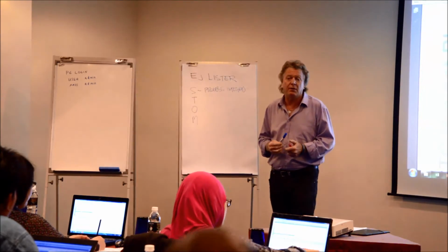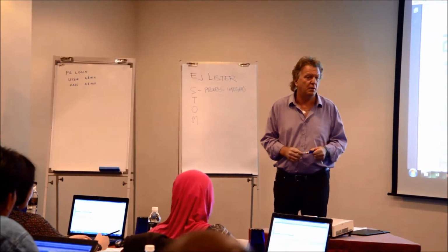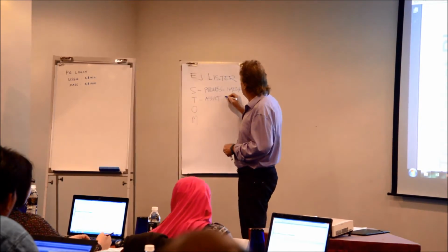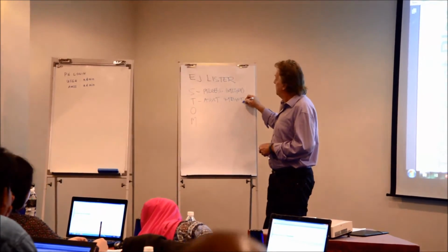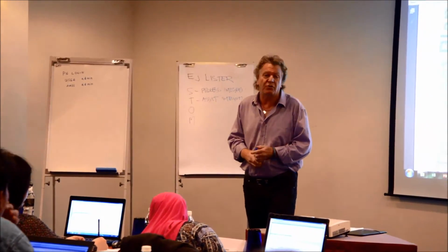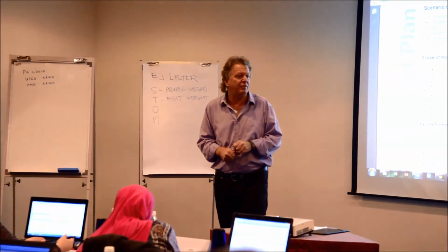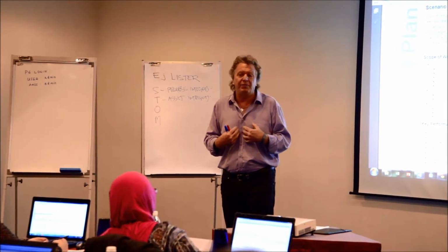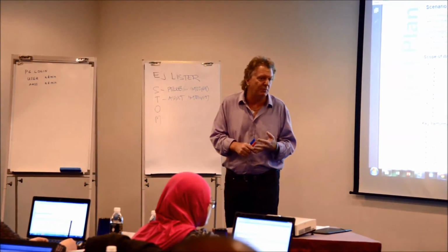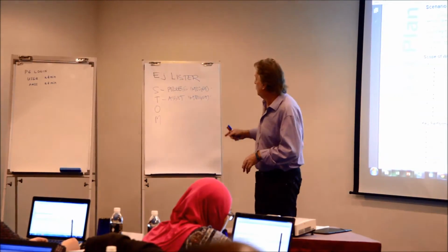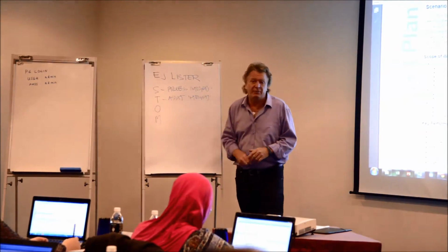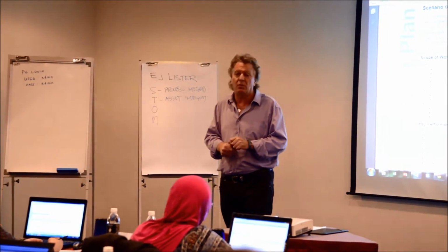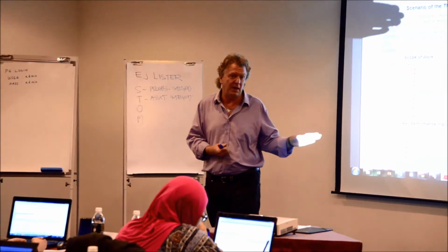So what do you think is turnaround? Process, exactly. This is asset integrity. And this has to do mostly with the pressure equipment and the piping, the pressure safety valves, and the integrity of the mechanical equipment that we have regulation on, right? The insurance company or the government says, you must do a turnaround. But they don't tell us that we have to do a shutdown. That's our problem. If we foul up our exchanger or we have an issue with catalyst, they don't care about that. That's our problem. Right?